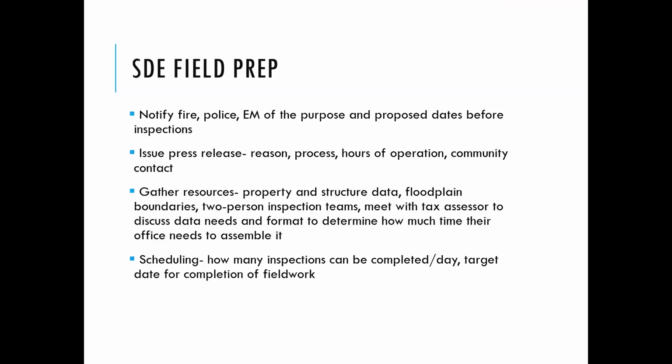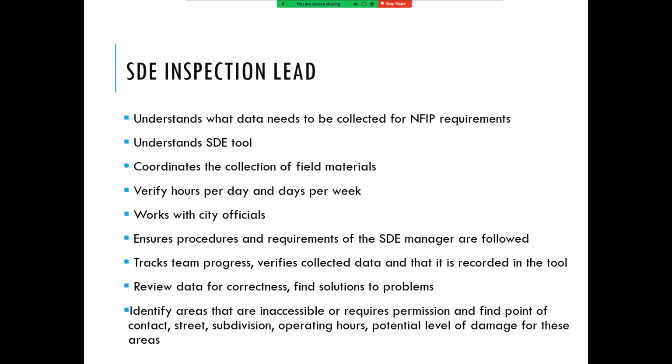Making sure you know the floodplain boundaries, having your two-person teams, and you probably need to have some kind of relationship with your tax assessor office so that they know what you need and then how much time they're going to need to assemble it. And then determining the scheduling, how many inspections can be completed per day. And again, what is our target date for completing that field work?